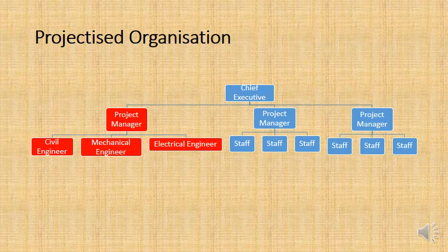I moved to a project office, and the mechanical engineers, electrical engineers, we were all employed and paid by different companies, but we were all put in a room together away from our regular jobs, and we were reporting and working together on just the one project, and it was great fun. And having that open office, having an office that was dedicated solely to the project, it meant that we had good communication, and we were able to be completely committed to reaching the project scope.